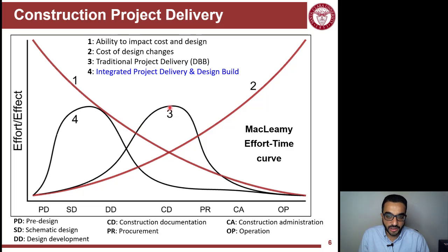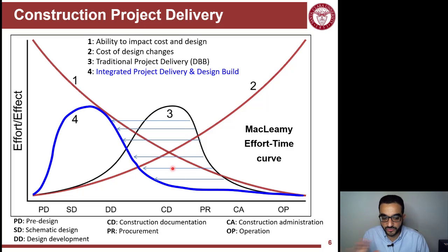But now integrated project delivery and design build try to bring a lot of people early on, making a lot of effort in planning and designing the project, and then that effort will be less moving forward. You plan ahead for a lot of time, and then the execution takes less effort in this case. So the idea is that shift of mentality and also shift of the effort curve you have.